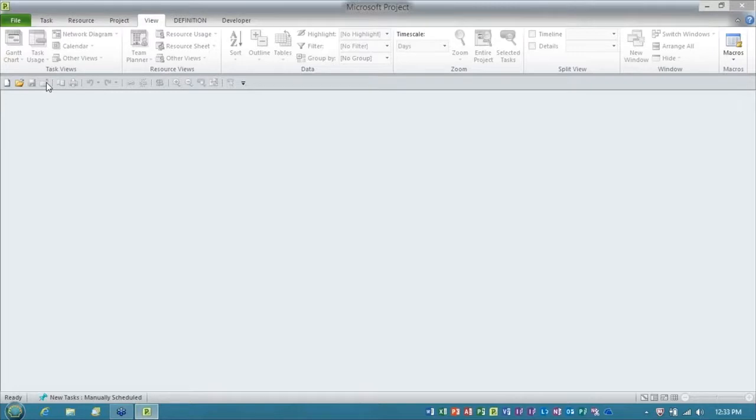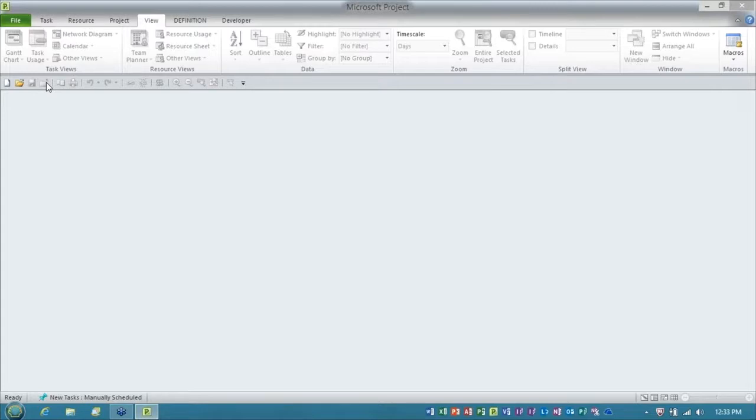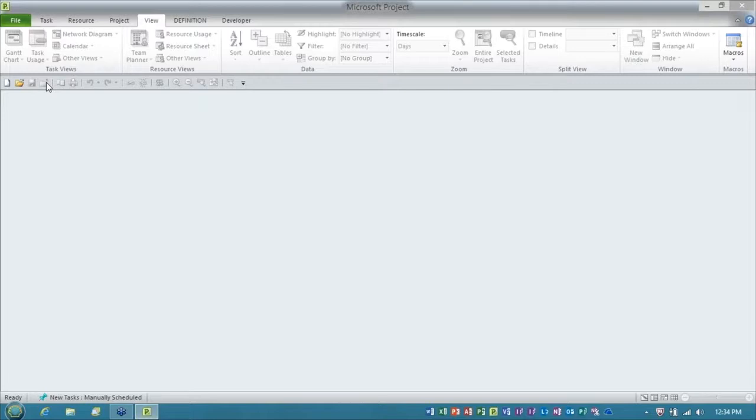Why is it important to keep the master temporary? Couldn't you keep the view in addition to the individual projects? Well, here's the thing. The master project is actually a file. It's a real Microsoft project file. It's an MPP file. A master project is simply a container that holds the other projects in it, either temporarily or permanently.